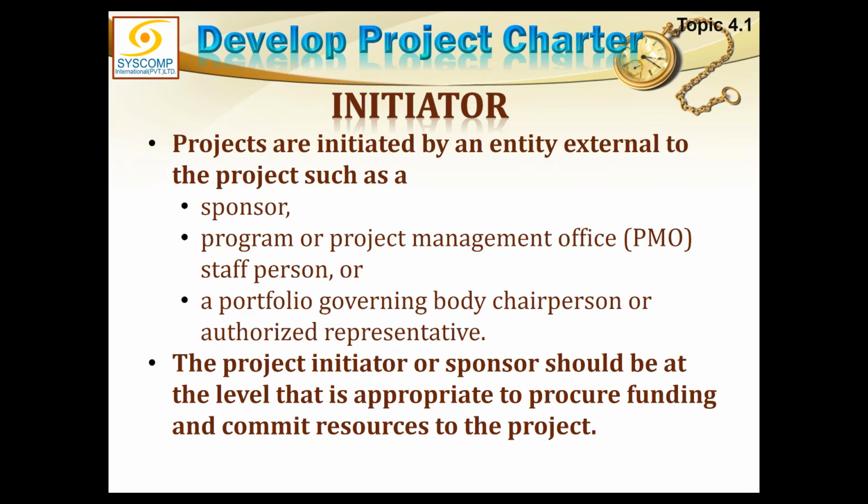Project initiator or sponsor should be at the level that is appropriate to procure funding and commit resources to the project. He should be a senior person with sufficient powers. He should be able to influence the players who are actually going to be providing the funding or the decisions about the project. So he should not be a junior person who cannot access all the right people to get the project done.